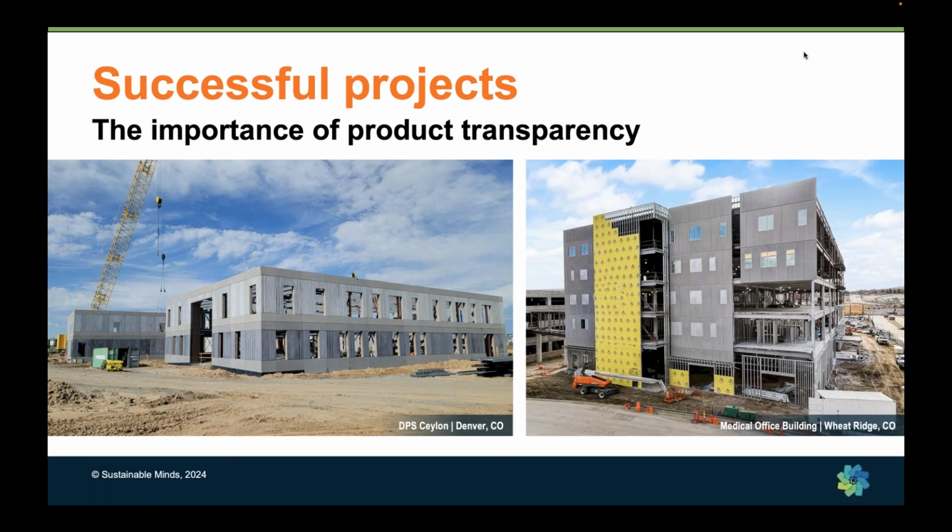But a most important part of this process was the early conversations with the owners as well as the construction management team and really understanding what the drivers were for the project. And the most important driver actually for this project was the schedule. Getting into that job site really quickly and getting off. Again, it's on a medical campus, and so the area is very, very tight. As well as the building needs to be secure so that they can get inside of it and get dried in and get the next stages of the construction done.